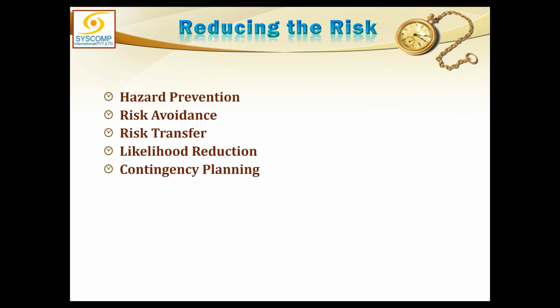So probably you leave it to the experts and outsource that portion of work to someone and pay them a premium for taking on that job. This is the cost of risk transference. But if something goes wrong, then they are responsible because you are paying that contractor to do that job, and if he doesn't do that, he will have to pay for it. So this way we transfer the risk to someone.